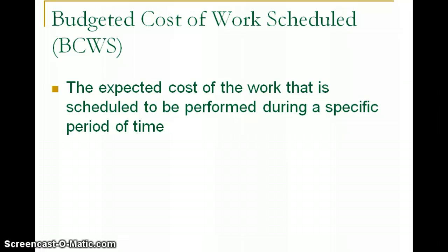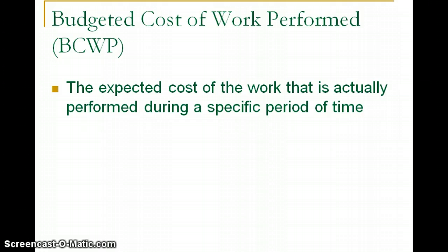The budgeted cost of work scheduled is what we use to calculate the SPI, or Schedule Performance Index, along with the budgeted cost of work performed.